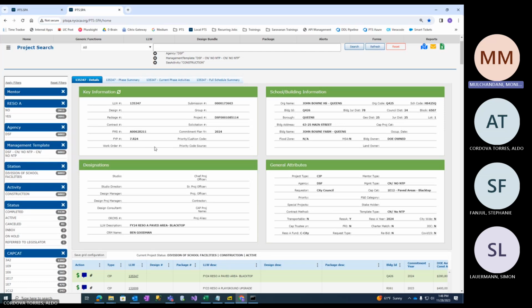Down the line, if the two things are related and would be designed together, say with this kind of roof and this kind of windows, or if it's on the first floor, we are doing this kind of windows, they get designed together. They're clubbed together to make a design bundle, and the A&E department works off those two LLWs together in the form of a design bundle. So it gives it a different classification or coding, a design number, and they work off the design bundle. Since they want to club them together, they give it a design bundle number and they work off design bundles.